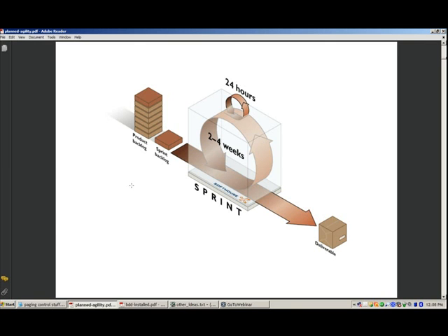And I think what user stories give us is a means of putting small items in the backlog that everyone can understand, everyone can see, and then we decompile it when we get to the iteration point. Then we start thinking about tasks. Then we start thinking about our design and how we're going to make this software happen in the context of the development team. Business users generally don't care, but they can see that story progress through its various states, whether it's waiting, in progress, done.